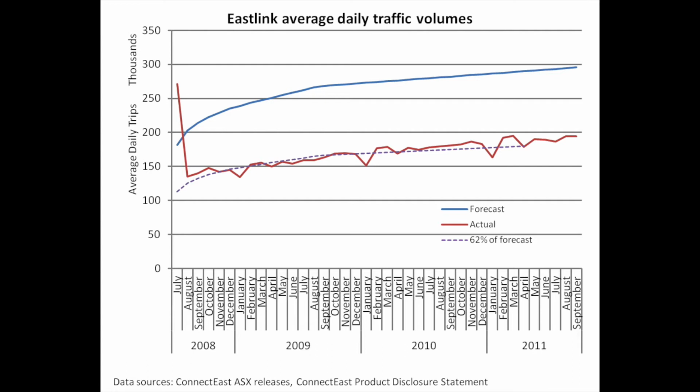As a result, whenever I read forecasted traffic volumes, I wind them back by 20 and 60% respectively to give the proper range for upper and lower limits.